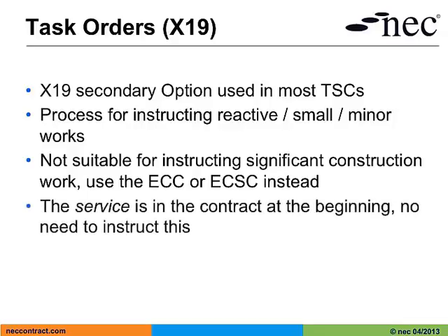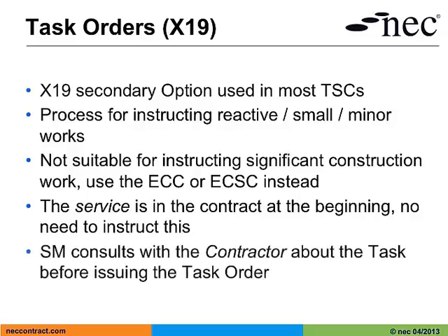The service is in the contract at the beginning. There is no need to instruct this, it just happens. There is a requirement for the service manager to consult with the contractor about the task before issuing the task order. The purpose of this is so the scope of the task order can be clarified, so that any timescales can be agreed, and so that a price can be discussed.